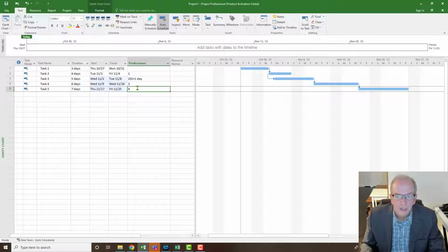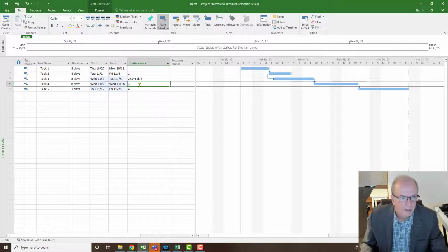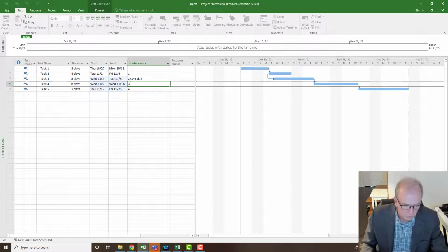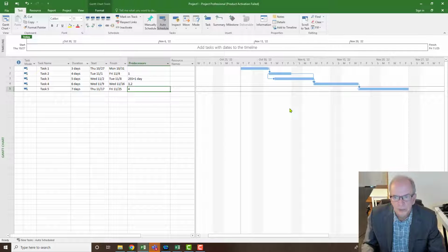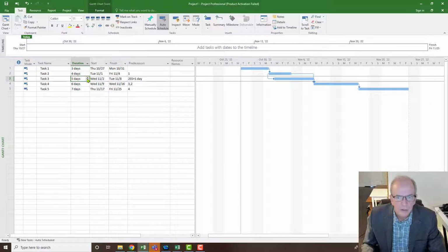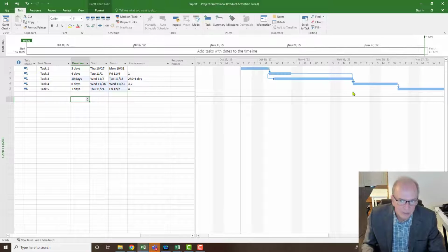So, keeping in concert with that, let's say I want to have here activity 2. So I'd put comma 2. So I got 3 comma 2. So there, I've got it closed off now, which is good because that means that would push this forward. At a certain point, this will push that other activity forward because I placed the link there.